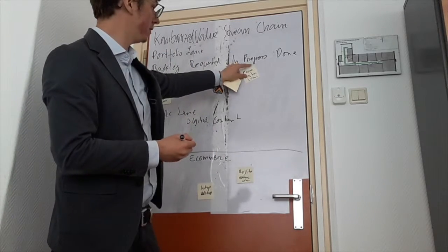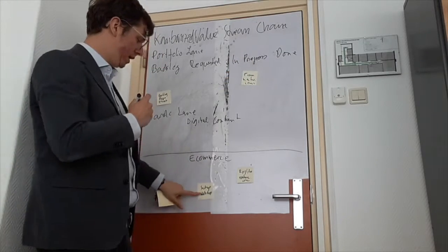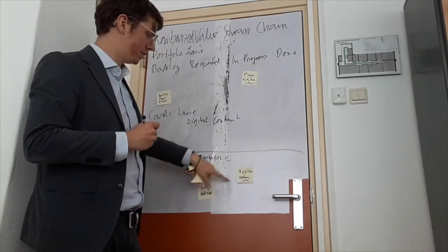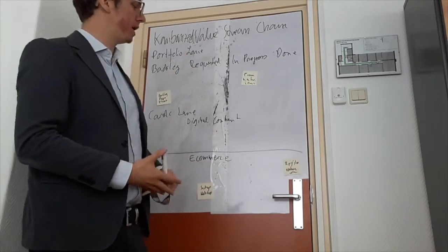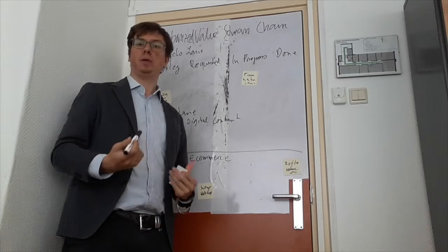And in that moment, this whole product moves into in progress, while it will only move into done when both of these tickets have been completed. So we move this to done because the domain has been registered. We see that there's still this product in progress.